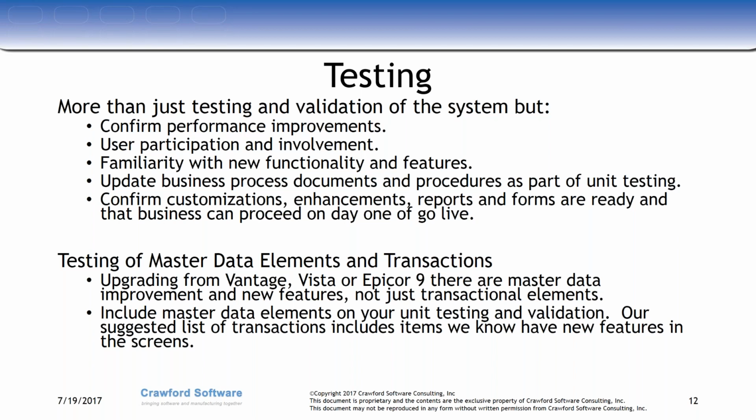We've found from prior experience that if we have a project where the team is there for the kickoff meeting, they wait 3 weeks and don't do anything while we go ahead and upgrade every customization, every enhancement, do a database copy of production and make it as close to live as possible, it's hard to get them re-engaged. So from the time of the project kickoff, we want to have them involved on regular. We have regular updates on status calls, weekly at a minimum.